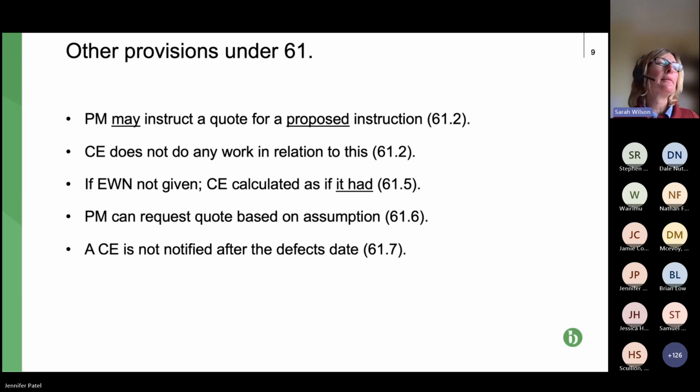So I've already said that we talked about implementation under clause 65, and that's not about contractors sitting back and not doing the CE work until the cost and the time's been agreed. The implementation's a very different point to that. The opposite is true, in that the subcontractor's just got to get on with the work whilst this process that we're talking about now progresses.